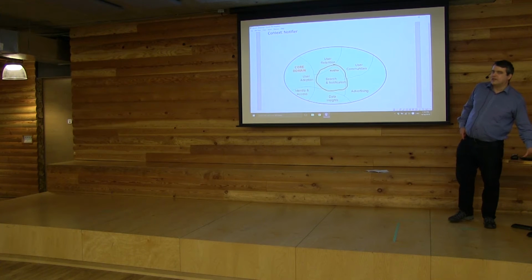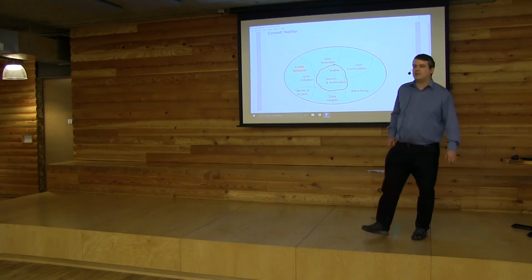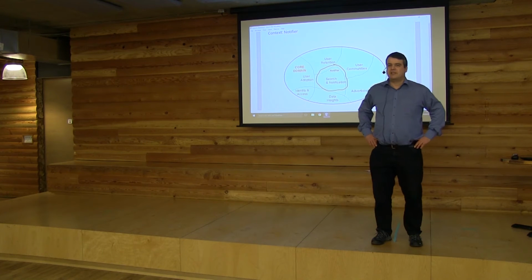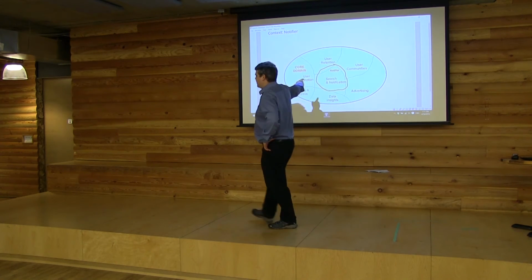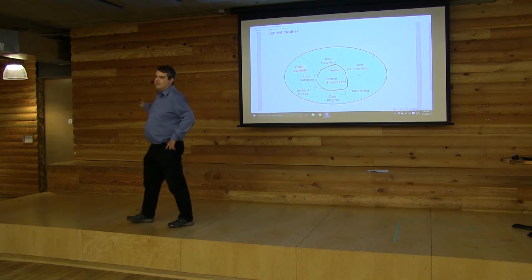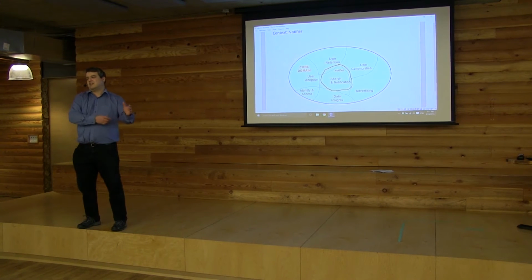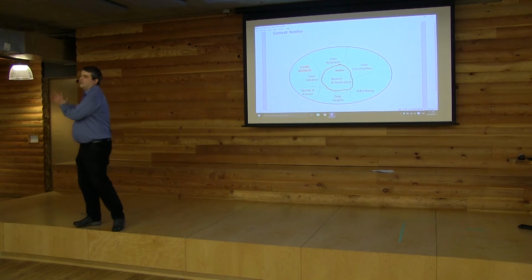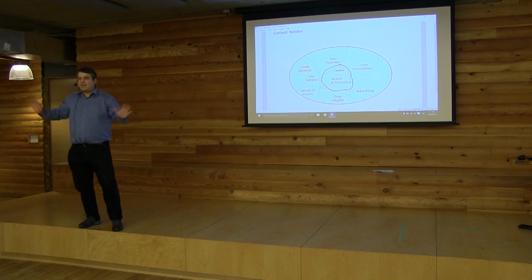So what you wouldn't want is a team which owns a searcher and another one that owns a notifier, and possibly have those guys geographically distributed, because if you do, it means, because there are different languages spoken in this, different usages of words and terms, that Joe thinks a user does this and is that, whereas Anna thinks a user does this and does that, because their domain language differs.